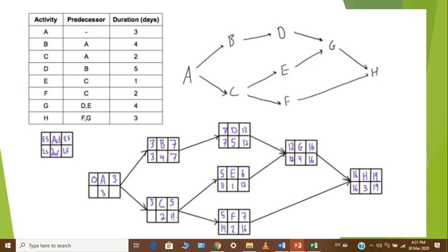we're looking at the smallest duration of dependent tasks. In this case, E and F. We see a 14 and we see an 11, and we pick the 11 to then give us 11 minus 2, which will be a 9 in this case. The 9 and the 3 are now sitting as options here, and so we would then move back to a 3, 3, and 0 to make sure that we have the correct data here.